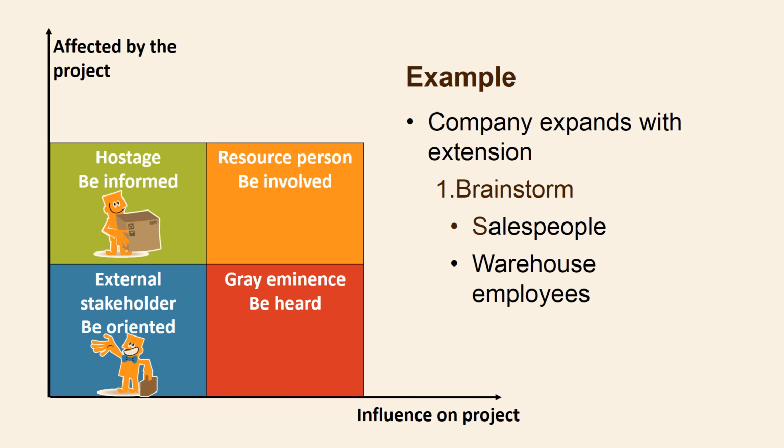It will affect the employees in the warehouse. They have to plan the move of all the items into the new building. They need to be informed about when they can begin this part of the project. The new building does not affect the chief accountant's department or his work. However, everyone seeks advice from the chief accountant in relation to major investments. Therefore, the project manager should interview the chief accountant and listen to his advice about the project's financial aspects.